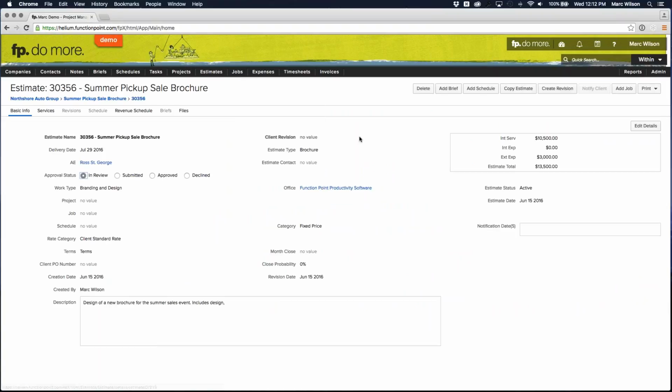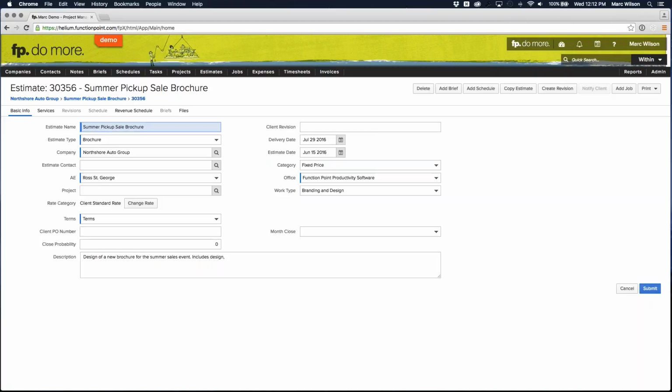A few things that I want to mention. Important items that you should make sure that your team is adhering to. When opening up new jobs, of course, as everyone knows, you start with an estimate or scope of work structure. I highly, highly recommend that you are entering in due dates whenever possible, even if it's not going to be exact and it might change, or you're not sure exactly what it's going to be. Enter a due date whenever you can.